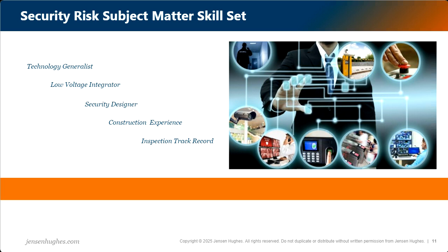You'll find that with these security deployments, it's one thing to demonstrate a design to the contractor, but you really want to look at final installation, a punch walk, a punch list. You want to go through a QA/QC process during rough-in. We want to make sure that all those subject matter skill sets are present during our assessment.